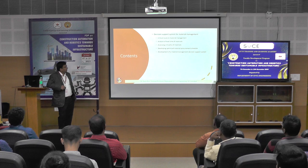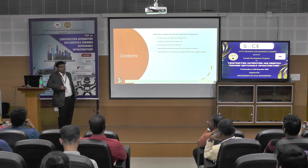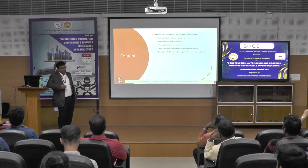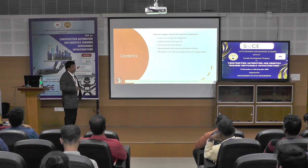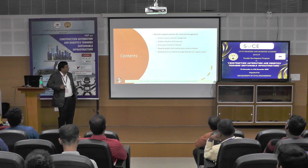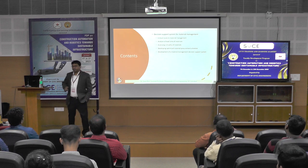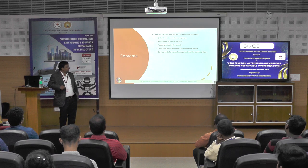While preparing the optimized material procurement schedule, we first analyzed the lead time and identified the critical factors that influence it. We also assessed the criticality of materials. Since budgets are limited in construction projects, it is necessary to prioritize procurement. We assessed material criticality based on different factors, and then developed the optimized material procurement schedule, which is integrated into a DSS-based support system.